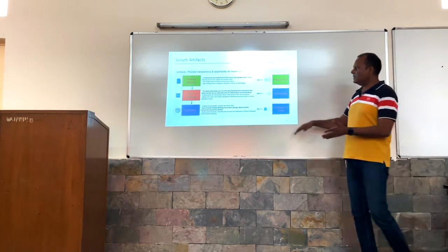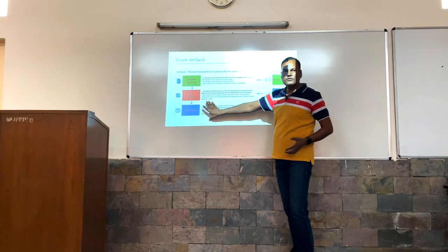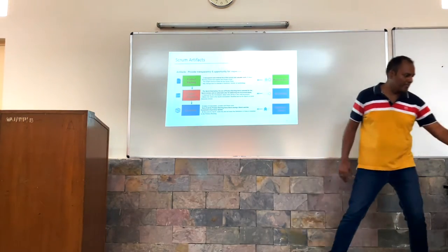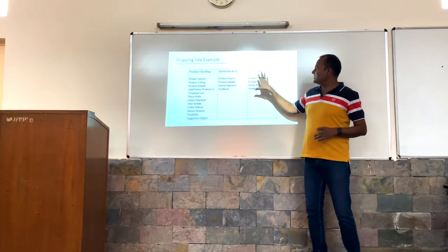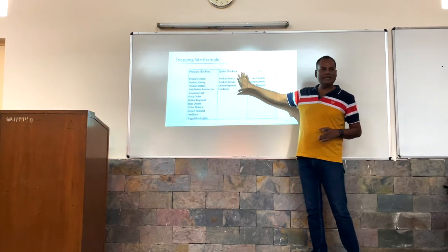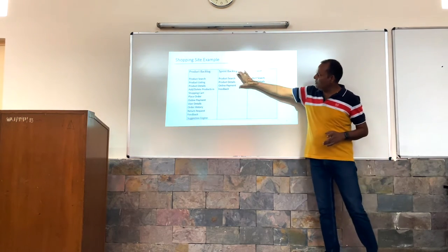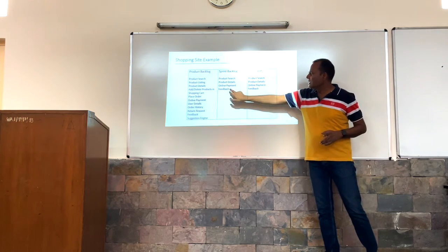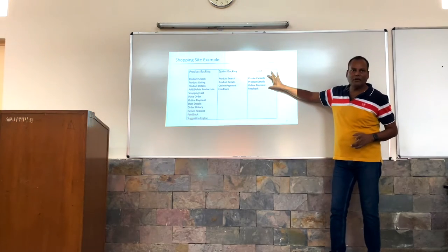Then after the finish of my sprint backlog, this is working software, like these are the set of work we were able to achieve as a team. Here again is an example of a success: the team decided to finish work in the next sprint and the team achieved those objectives. But if sometimes the team is only able to finish this much work and not the rest, then it's moved back to the product backlog, and this is my increment only.